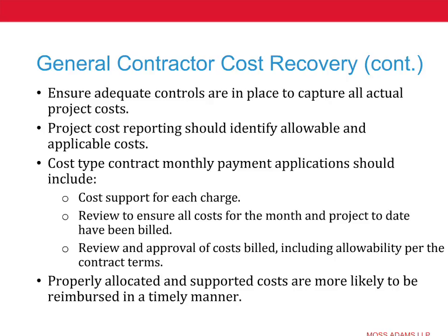Project cost accounting and reporting should identify allowable and applicable costs. What that means is allowable means a cost that is specifically delineated as something you can charge, and applicable, another word for applicable is allocable. So there are a number of costs that are incurred that apply to your job that you need to be sure to capture. And you have to understand that when you're negotiating the deal, because you're going